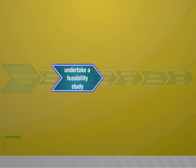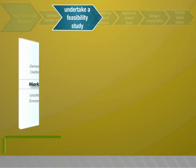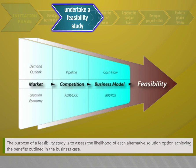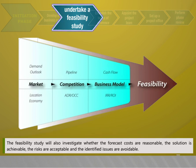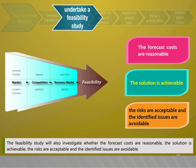A feasibility study may be commissioned at any stage during or after the creation of a business case. The purpose of a feasibility study is to assess the likelihood of each alternative solution option achieving the benefits outlined in the business case. The feasibility study will also investigate whether the forecast costs are reasonable, the solution is achievable, the risks are acceptable, and the identified issues are avoidable.